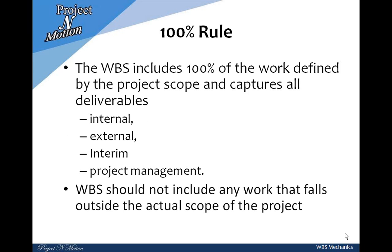While designing the WBS, one rule is very important to follow: the 100% rule. The 100% rule defines that WBS should have all the deliverables defined in the project scope. It is important to understand that we are talking about deliverables, and the sources of these deliverables may be different, such as internal, external, interim, and project management. These categories include all possible sources, and therefore WBS will hold all possible deliverables of the project, leading to a complete scope.